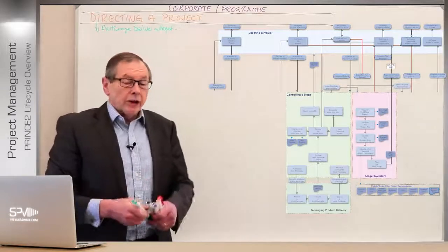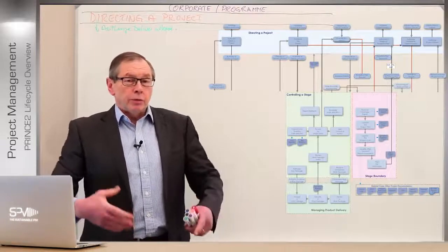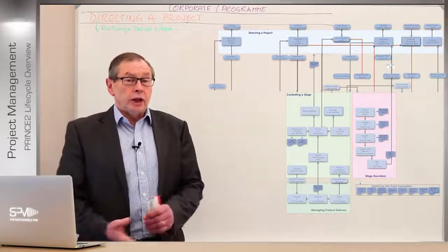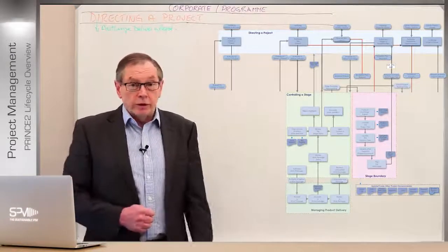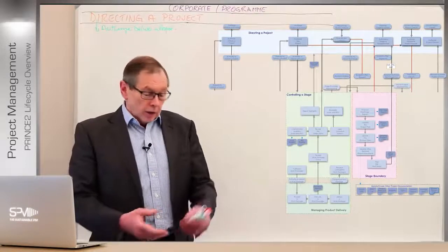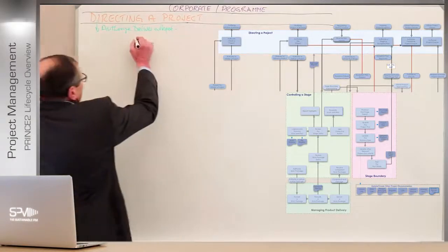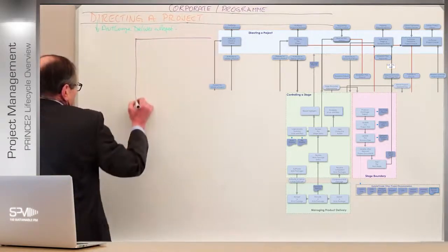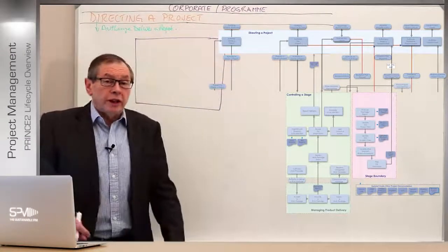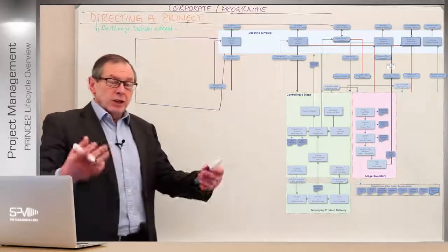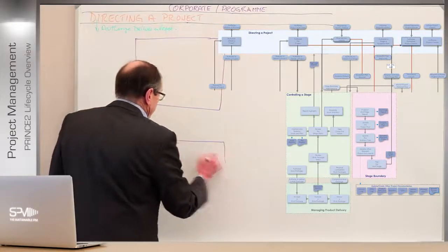Now, once they've done that, we then move into the second stage. Now we're in the second stage. So a project in a PRINCE2 framework can have two stages. Right? One is usually the initiation, and the next one is the delivery bit. So you might have one delivery stage. So we're going to look at that right now. And we have two processes happening in this. The first one is controlling the stage. And this is where the project manager will sit and orchestrate everything from their deck chair, whatever it happens to be. They'll orchestrate the functionality and the project itself.